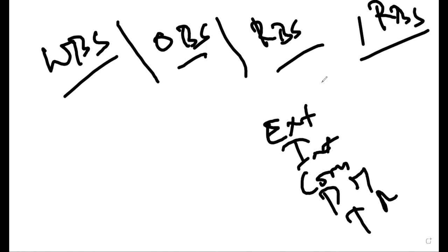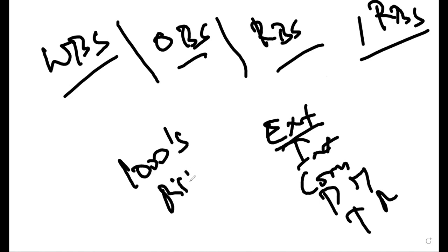What is the benefit the project is going to gain? You can plan to mitigate those. Say you have thousands of risks registered in the risk register. Can you focus on all 1,000 risks at a single glance and prioritize? If you bring the risks into categories, you can see which risk you need to prioritize right now.